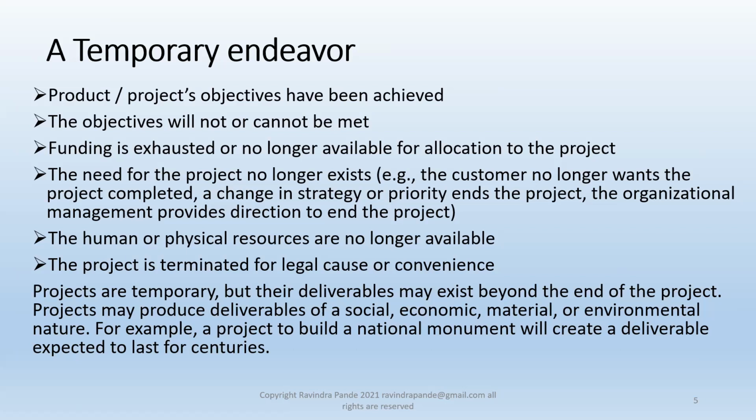If the need for the project no longer exists, or the customer no longer wants the project completed, or a change in strategy or priority ends the project, or the organizational management provides direction to end the project. Even if there is an enactment for such products not to be sold or created in that region, we might need to close the project prematurely. The human or physical resources are no longer available. Let's say you are creating a drawing, an artistic project, and the artist might not be available, and so on and so forth. Then you need to close the project prematurely.